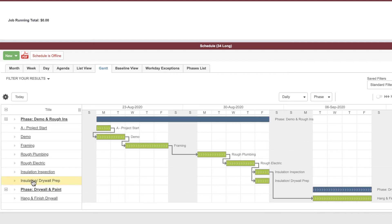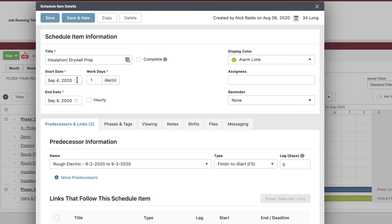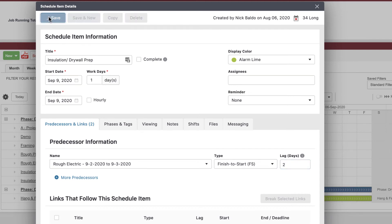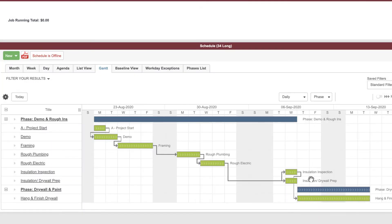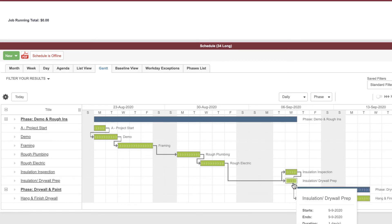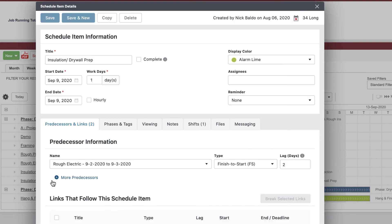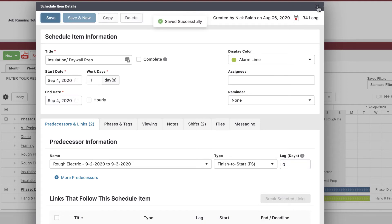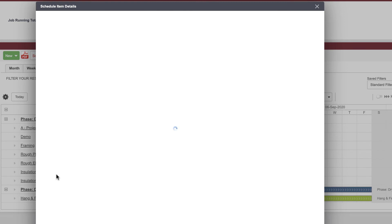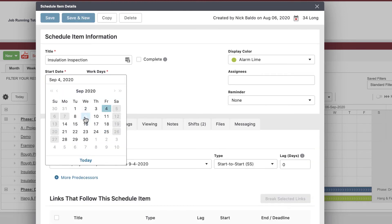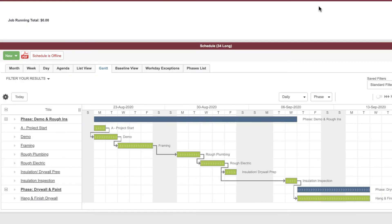What happens if my insulation inspection moves? Let's say they called and said they're not coming until the ninth. I just moved it — notice it updates the lag on rough electric so everything stays consistent. When that happens, my hang and finish drywall bounces out. Let me also correct — insulation and drywall prep can still happen on the fourth with no lag, but my inspection gets pulled out by a few days. You can see it pushes out everything dependent on it.